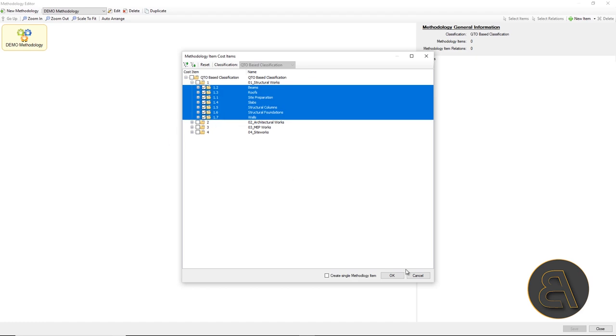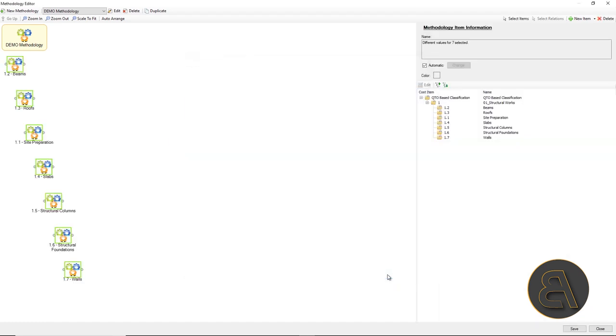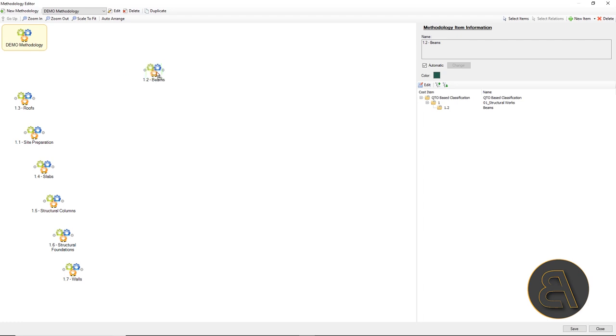When we create a new methodology, we will load the linked cost items at the category level, like foundation, beam, slab, etc., and create relations between them.